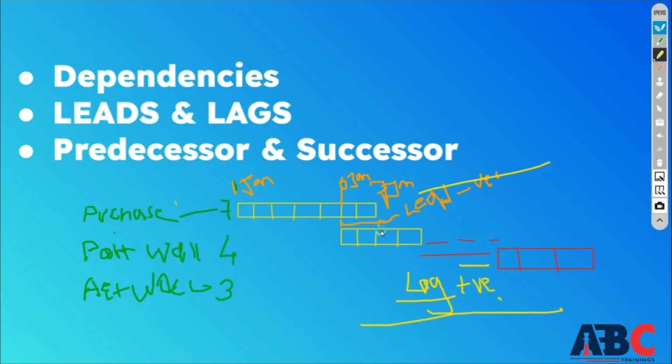So this is your lead and lag. You must have understood both. If an activity starts before the previous activity ends, then this is lead. And second, if it starts with a delay of 2 to 3 days, we call it lag, which is applied positively in the schedule.